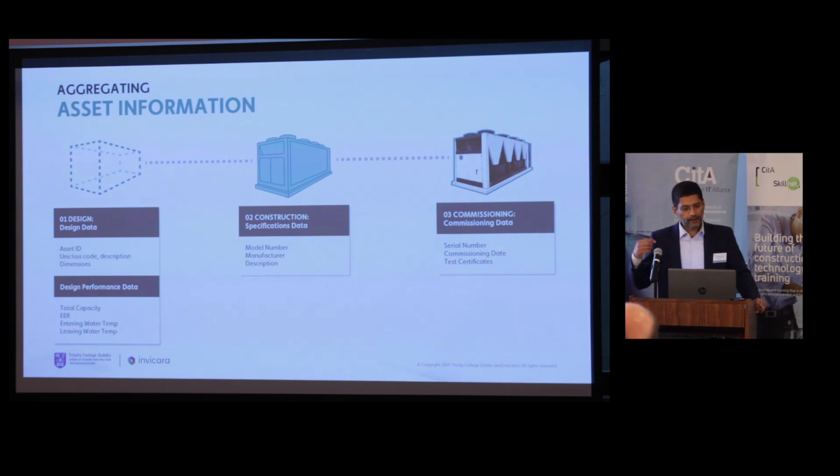The reason I wanted to present this slide was that we always talk about LOD as in maturing geometry over time. We are not generally conscious about maturing information over time. And the challenge is in doing that, because it's not just the designers. It's also the main contractor, the subcontractor, the specialist contractor, the commissioning agent. Information is produced by different stakeholders in the process.